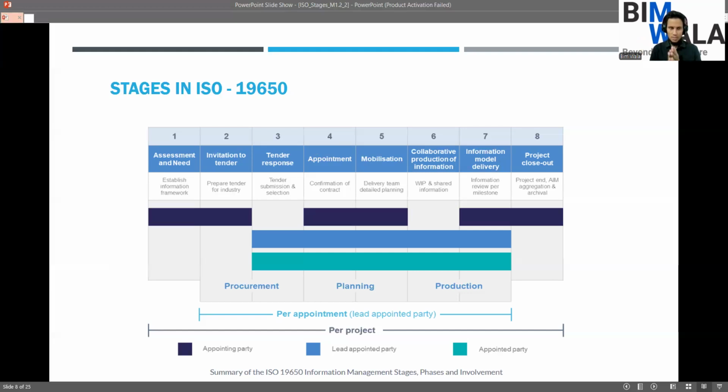But what if you are in the planning stage or in the designing stage? So mobilization is nothing but the formal start of your work, whether it is a designing work, a construction work, or maybe some survey work. So mobilization means the client is ready to pay you some token amount, so that you can plan or start executing the works.